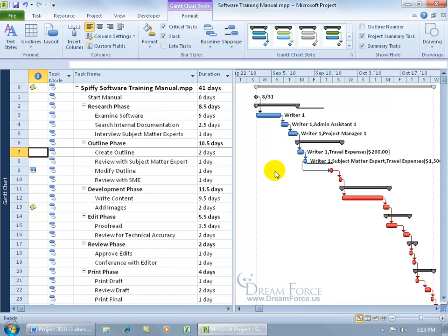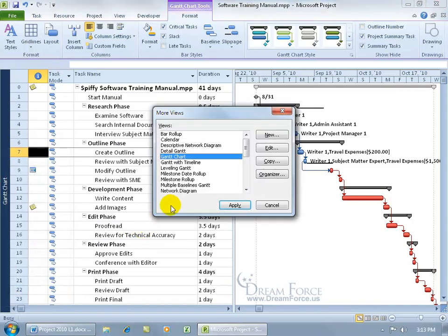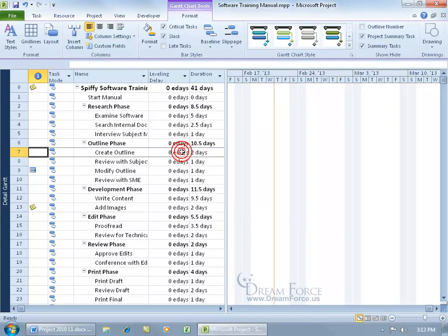Let's change views and go to the Detail Gantt view by coming over here and right clicking on the view bar, going down to More Views and select Detail, double click on it.